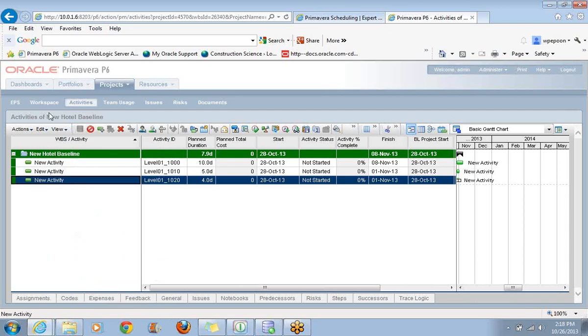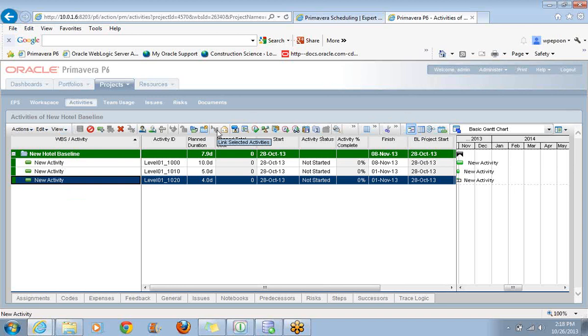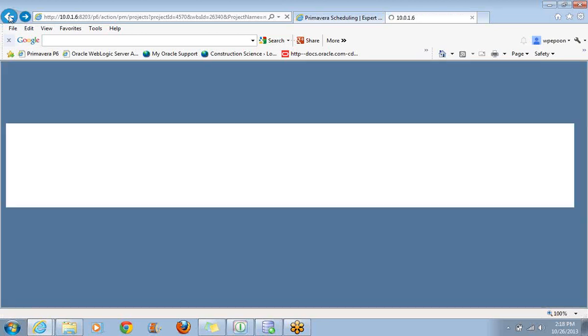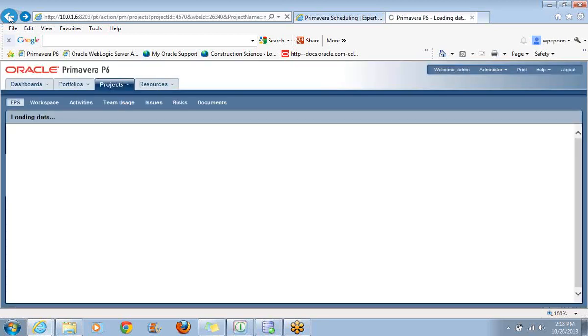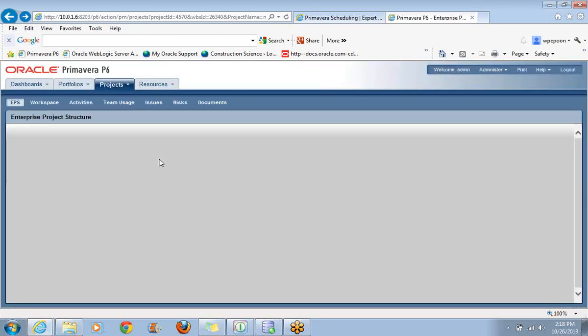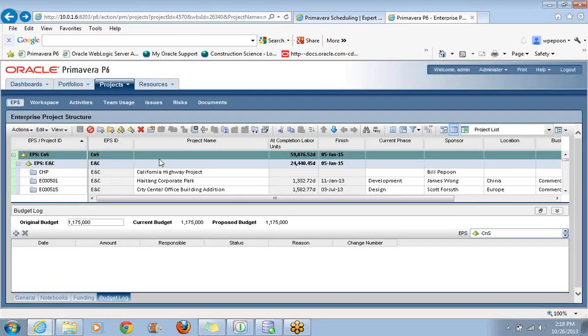Now the view, to make sure I don't lose this column I just added, I'm not getting the same visual clue that I get with adding a new activity. I've actually got to come up to View and go down to Save. Now we're okay. If I click and go to a different window, we will have that column still there. Notice though, to back out of this screen right here, when you've saved a view typically, you reach that dead end. I've got to hit the back arrow.